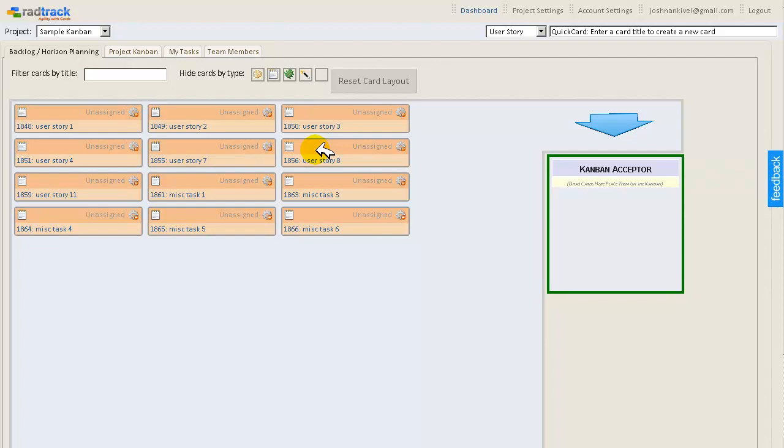They can come over to me and say, hey Josh, I got this request to do this thing. Where does this fit in terms of priority? And we can take a look at it and see what's on your plate right now. Let's just say that 2 or 3 of these are assigned to them. I actually use different colored stickies for each person, so you can easily see, okay, all the yellow stickies are John. And then you can say, well, this is what's on John's plate. You can take a look at what he's got, and you can negotiate priority based on that.